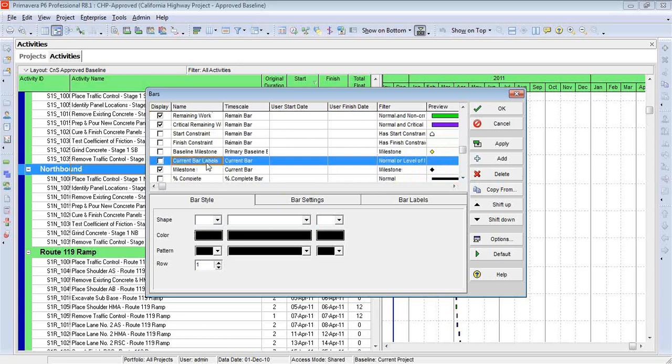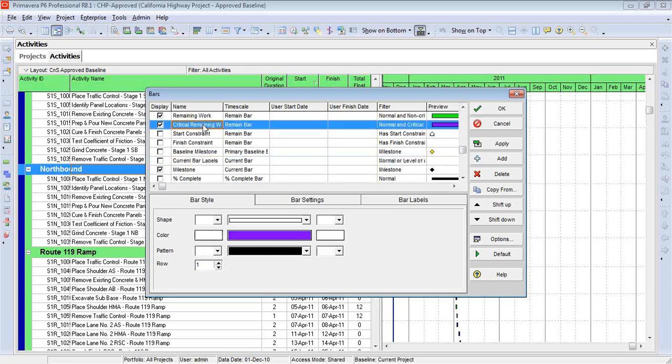In other words, when I want every single activity to have the same type of label, we choose this. In some instances, I'd like the critical path to have one type of label, but other activities to have another. So for example, I could show something like the start and finish date as a label on this activity, and I could show total float on those that are non-critical.